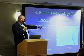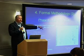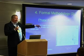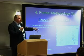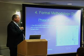What this also does, if you're interested and want to use it, you can take your resources and figure out how much per hour they cost. And it'll also calculate what your entire project costs are, even including personnel, which is an interesting thing to do. So if you know you've got to hire people and they have a certain rate, like a stage director or an orchestra conductor or musicians, you can actually put that rate in there and it will aggregate what those costs are, and you can use that for estimating your projects.